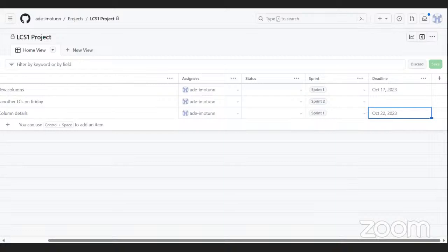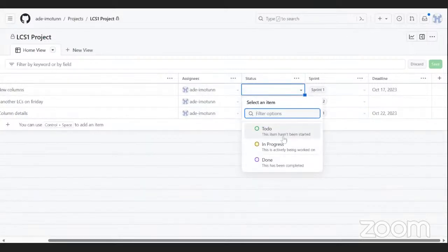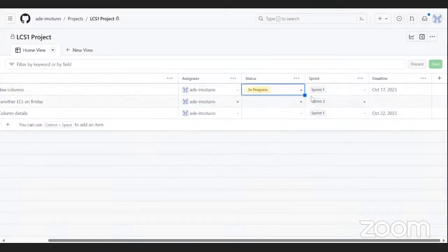So most times when you are working, in most companies, what we do is that for a sprint, there are specified days for stand-up. So stand-up happens at least two or three times in a sprint, where you give an update of your progress. So it is not just editing into the in progress. After you edit into the progress, there will be days for stand-up meeting where everyone comes to give a progress report on whatever it is that they are doing.